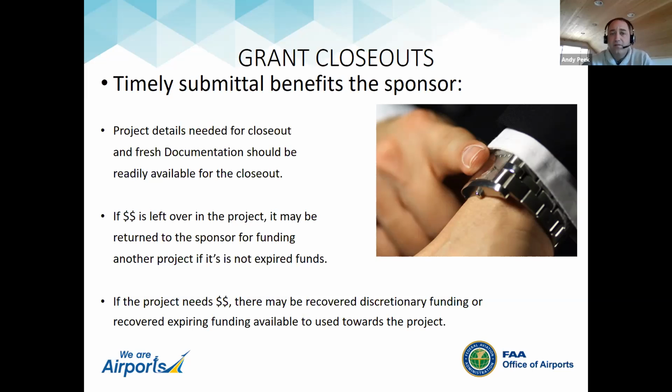If there's money left over at the end of the project, if we time it right and it's entitlement funds, that can be returned to the sponsor for future funding in another project. If it's not timed right, that money just expires and isn't available to the sponsor. Additionally, as Jake mentioned, through a closeout, if more money is needed, we may have recovered discretionary funding or other funding available to be used towards the project. But if we don't have the closeouts in a timely manner, we can't pay for those.